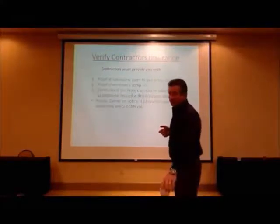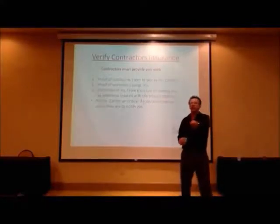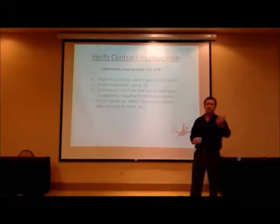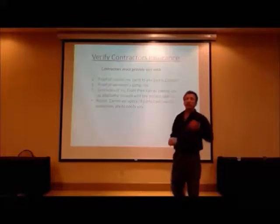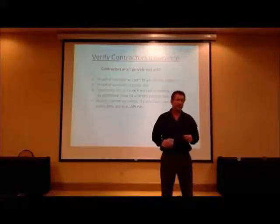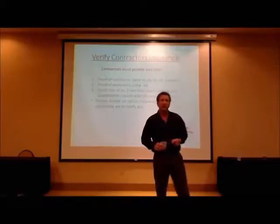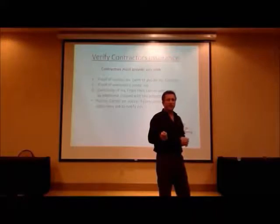You had this question? Verify your contractor's insurance. If they walk in with the proof of insurance, don't take it. Make sure that the insurance company emails it to you or faxes it to you. And then get a hold of the insurance company and tell them, if that contractor cancels that insurance policy, I want you to call me. It won't be the first time that somebody got an insurance policy, a 6-month policy, and showed it to you, and 2 days later they canceled it.